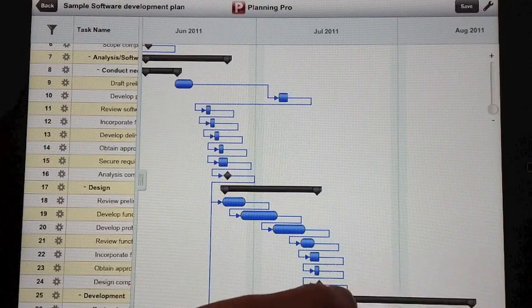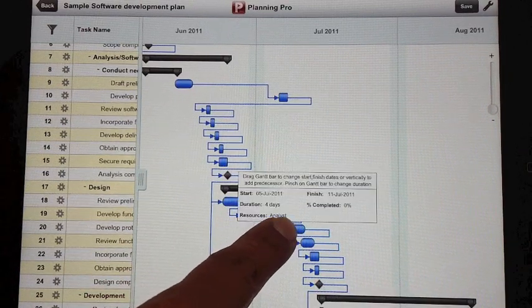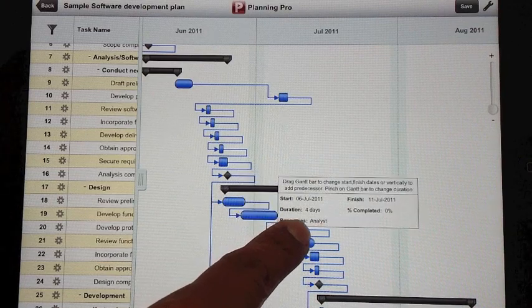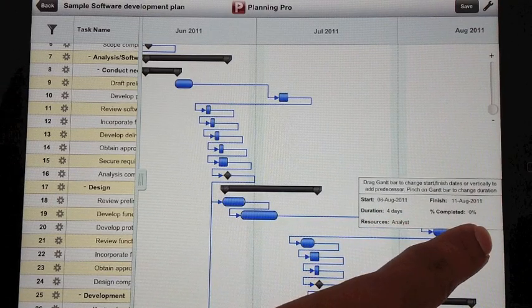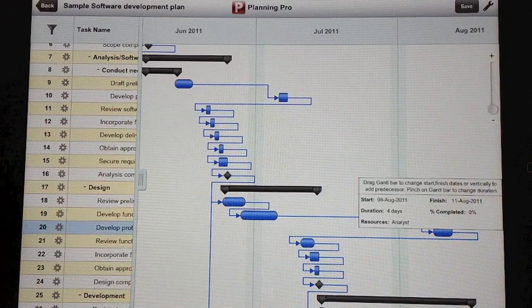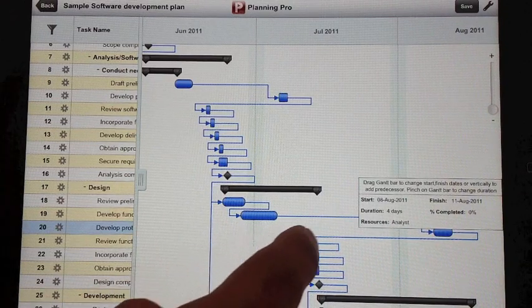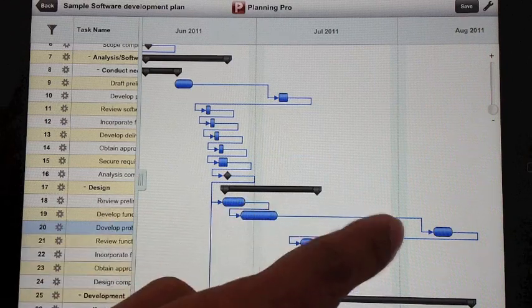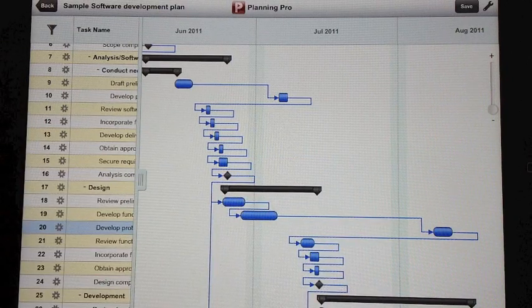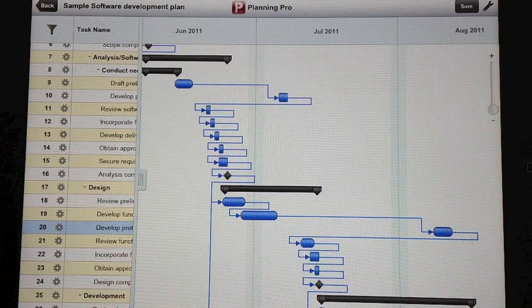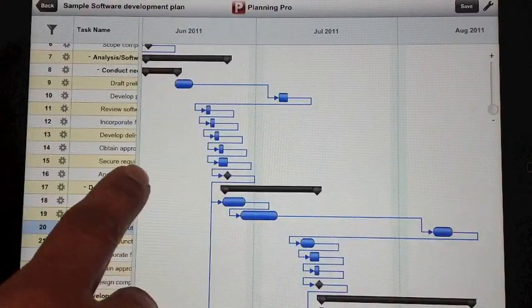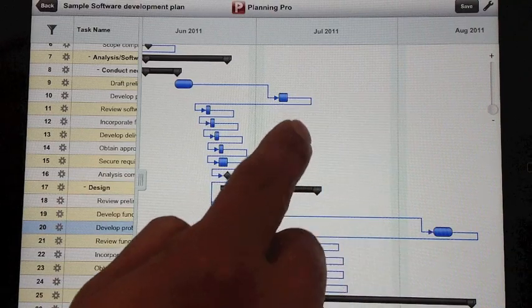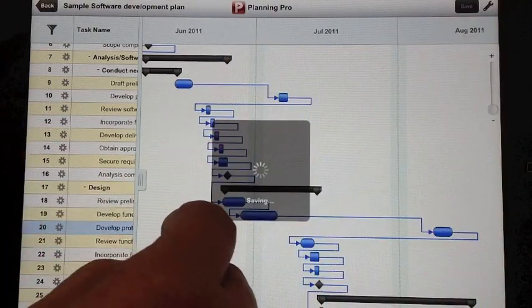Let me hide the Gantt view. I can click on a Gantt, select on the Gantt and then probably move it to the new start date and finish date. So what I did just now was just move the Gantt, it allows me to start date and finish date. I can also pinch on the Gantt which will change the duration of the task.